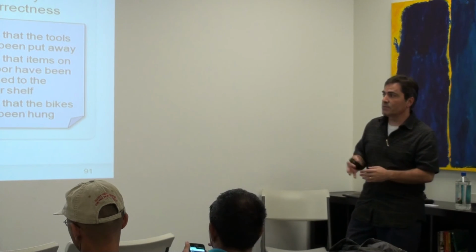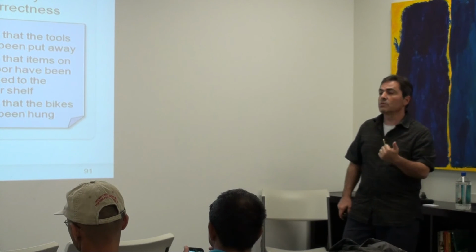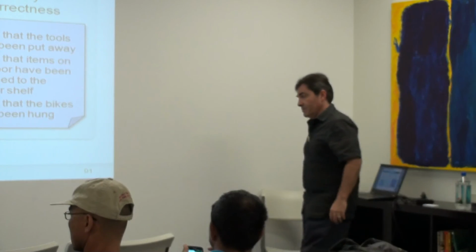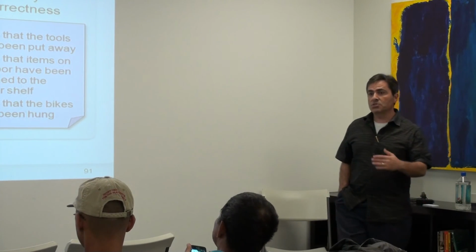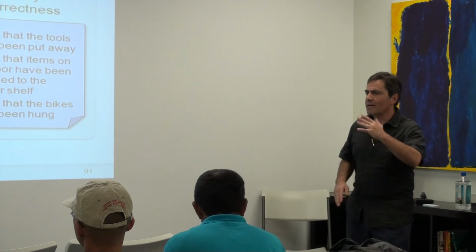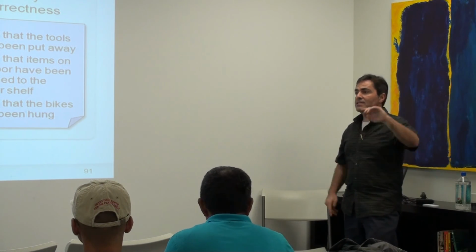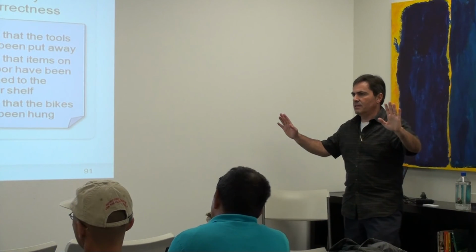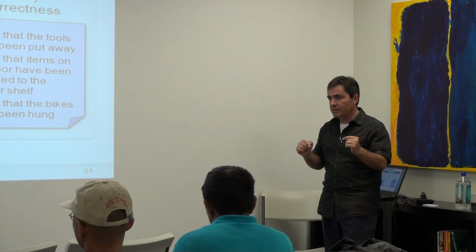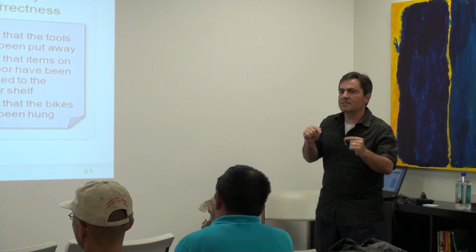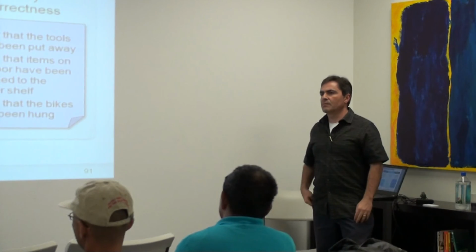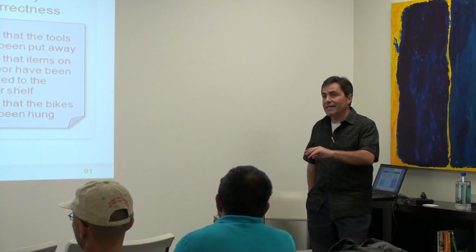So in Scaled Agile Framework, the product owner role is a full-time role. You can't be a product owner in development. Are they different from product manager? Yes. So that's another thing: a product owner is a much more tactical role. So if you think about the Salesforce.com example, the product manager might say, hey, we need to integrate with this module of Salesforce.com. That's it. The product owner that lives on the team will have to figure out a lot of the details and the mapping and dealing with the error conditions and dealing with the situations where we're trying to put a square peg in a round hole, all those details. And so that's a full-time role.